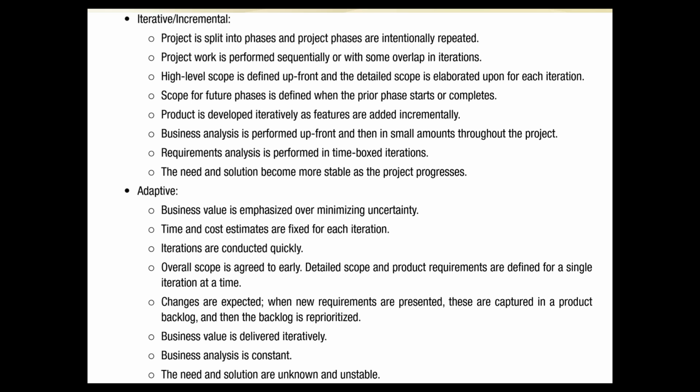Yeah, that is the advantage of Agile. In Agile, we make such small iterations or phases that after the end of every phase, we deliver whatever we have produced. So we have nothing more to do. Now we enter into the next phase and we ask what can be done in this. So we will commit with the stakeholder that at the end of this phase, we will deliver you this thing. He says, I need to change anything. I say, okay, this phase has already started, so you can't change anything. You have already agreed on it for a 2 week iteration. You can't change anything in it. But whatever you want to change in the future of the project, you are most welcome. So I will deliver that thing which we have already agreed.